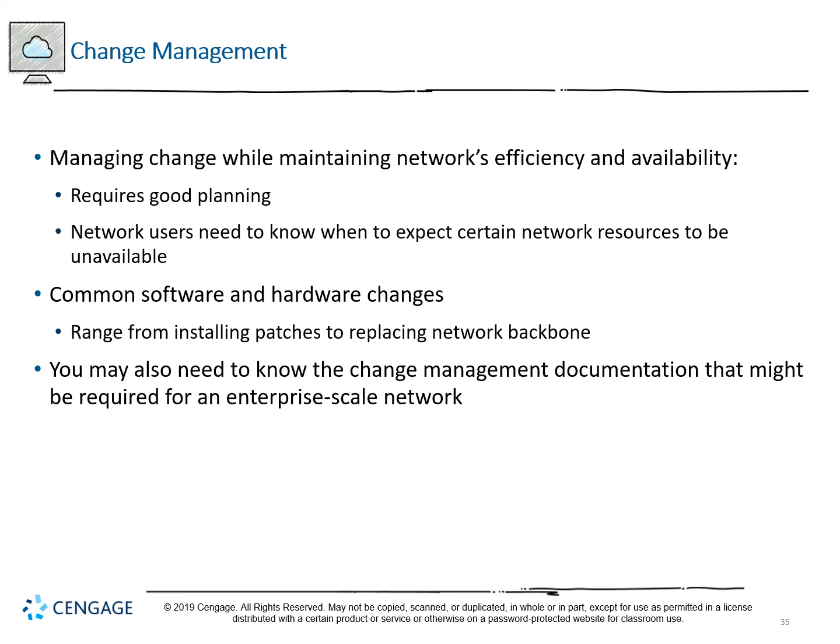If people come in and they say, okay, we've got that big project we've got to get done for so-and-so company, let's go ahead and buckle down and get it done, and then on Wednesday or whatever it is that they start doing it, the network's going down. They've got a planned maintenance thing where they're like, yeah, it's going to be down for like 6 hours. If they had known that, maybe they would have done some more work on it on Monday or Tuesday, or maybe they would have gone to an alternate site, maybe they would have rescheduled the maintenance, any number of things. So change management is all about communication, transparency, and good planning.